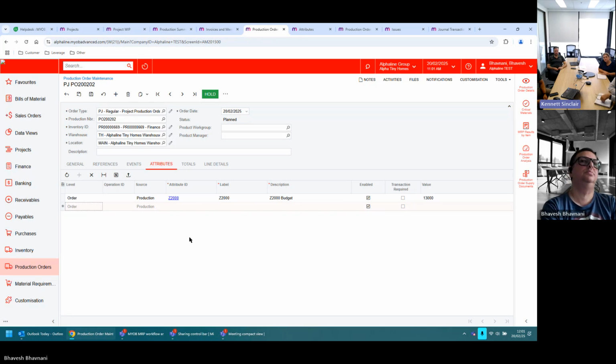Yeah, but you're still not comparing. Could you do a journal entry? That's what I was wondering. Yeah, you might have to still do your own journals because otherwise you'll have to do an auto reversal journal or something. So to show that cost of goods sold for the month, and then obviously it's auto reversal, so it will go back to normal in the next month. I think from our side, you've got to match income with corresponding costs.